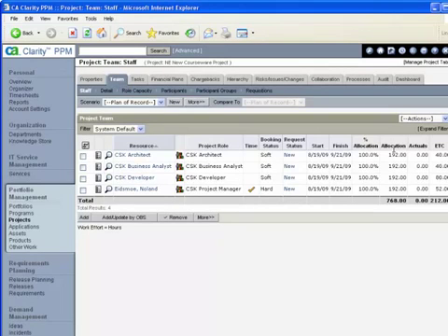The next one, right next to it, is actuals. Those are actual hours by resource. Only named resources that are open for time entry can charge to the project. In order to have actuals on the project, you have to be allocated to the project. It's your only access to get it onto your timesheet. And through the normal timesheet process, actuals will only show up here once the timesheet has been submitted, approved, and gone through the posting process.